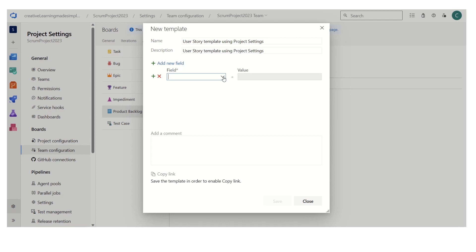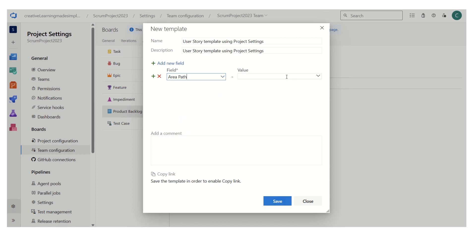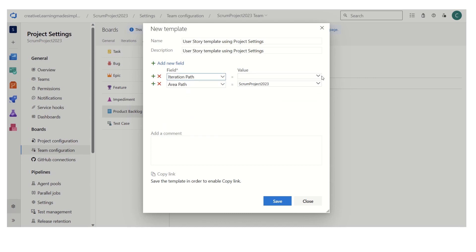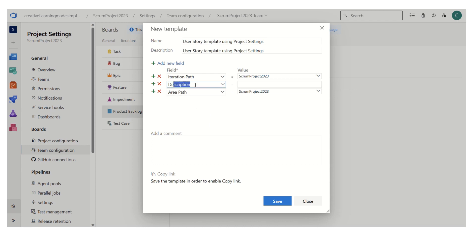In this field we can keep on adding new fields that we want. Let's say the area path — we want this one. Similarly the iteration path — we want the Scrum project 2023. We also want to add the description, which is the story definition.